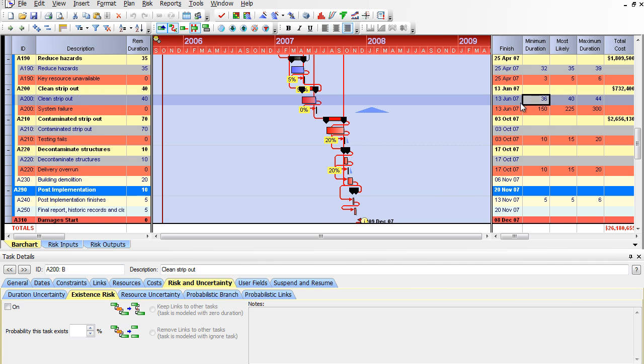So if we could, we can look at mitigating. Maybe we can't mitigate and we have to go to a different area. But what the goal would be is to focus on the areas where maybe we could bring things back in line. If we can't, maybe we have to do something else. Maybe we have to resequence. Maybe we have to do something else. But at least we know, hey, based on everything we've done to mitigate, we're still about 60 days out. So we need a recovery plan that saves us 60 extra days. What are we going to do? So going through this,